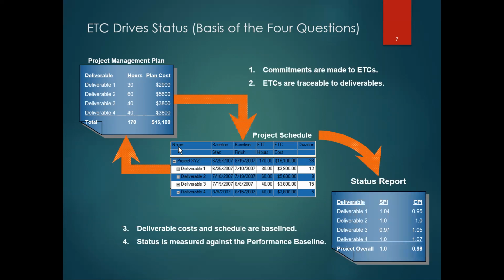Additionally, now moving forward, now that you've got a project schedule set up this way, as you begin to record actuals against the schedule and updated ETCs from your resources, you now can begin to drive, if you wanted to, which is implied in the status report, your schedule performance index, your SPI, earned value management right out of the PMBOK, or your CPI, your cost performance index.